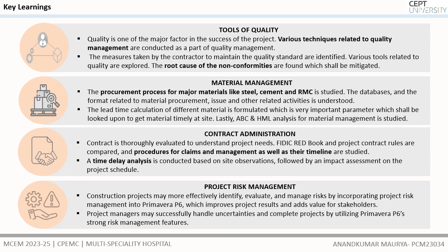In contract administration, the contract is thoroughly evaluated to understand the project needs. FIDIC Red Book and project control contract rules are compared, and the procedure for claim management as well as their timelines are studied. A time delay analysis is also understood in this deliverable. It is conducted based on the site's observation followed by an impact assessment on the project schedule.